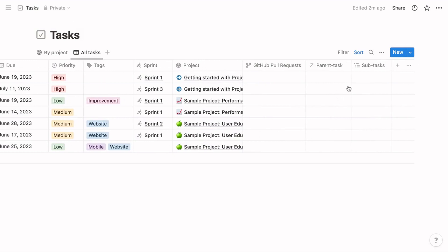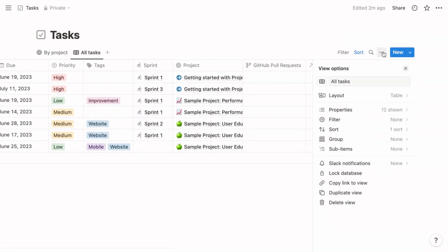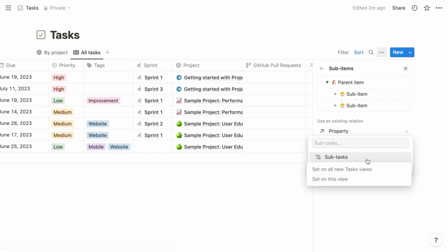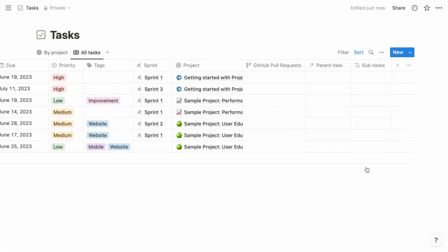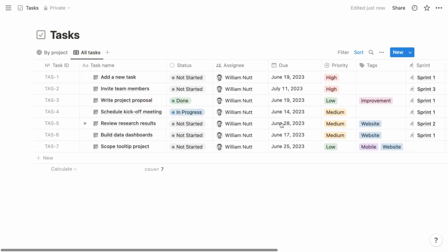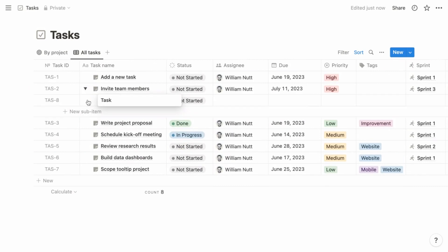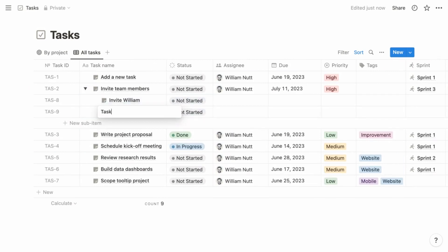The parent task and subtasks properties are reciprocal relation properties that allow you to divide a task into smaller tasks. Within table and list views, you can enable sub-items. Items that are assigned sub-items become toggles that display their sub-items within them. I'm surprised to find this configuration unutilized in Notion Projects. The Notion VIP template enables sub-items.